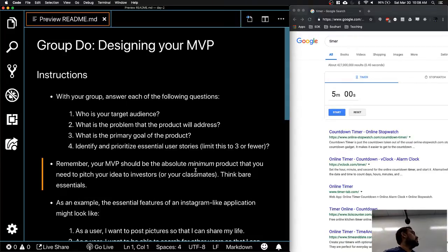Okay. For example, let's suppose you are making Instagram. Okay. When I talk about Instagram, right, what would be my minimum viable product? So this minimum viable product is a project that is a minimum requirement to get this thing up and running. Okay. So the minimum viable product for Instagram would be that I, as a user, I just want to upload my picture and it shows up on my website. That is it. That's the bare minimum, right?